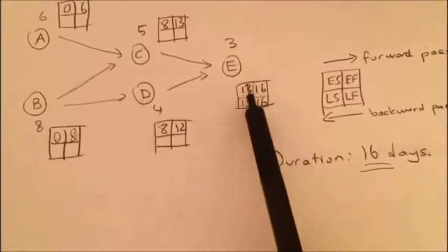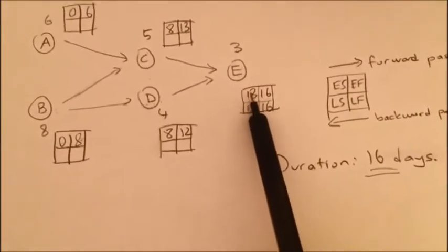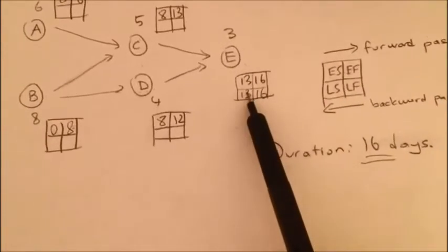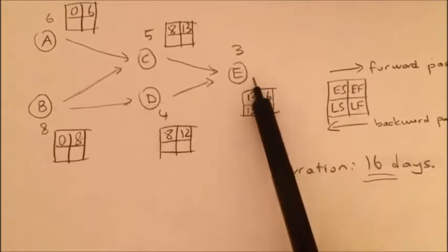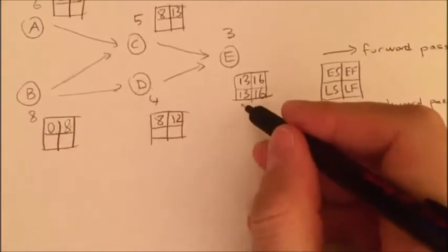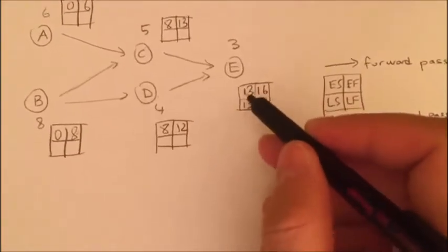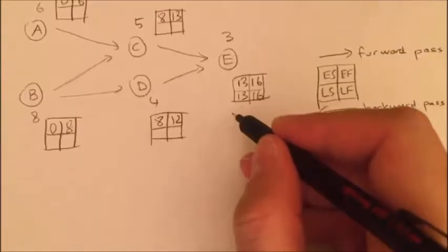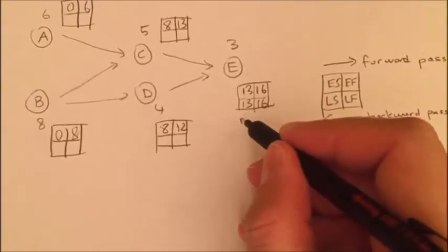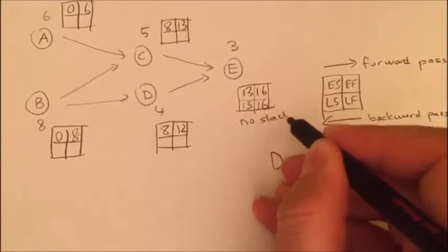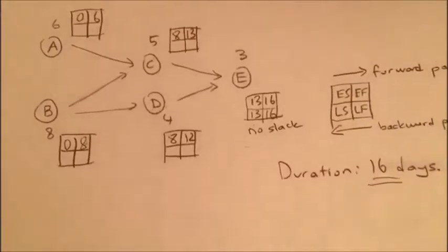Is there a difference between the late start and early start for activity E? No. That means I cannot have any change on this activity's start or finish. There is no slack here, no slack, so you cannot really delay that activity.